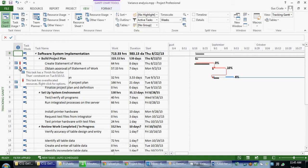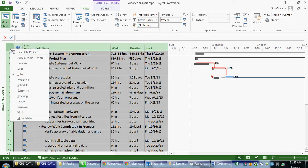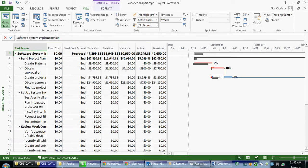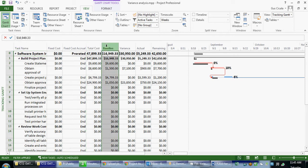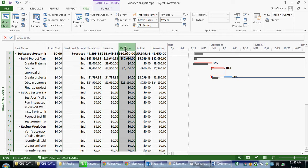One of the best ways to find cost variances is to think of a table that contains cost information. So if we apply the cost table, we can see cases where the total cost is different than the baseline cost and has generated a variance.